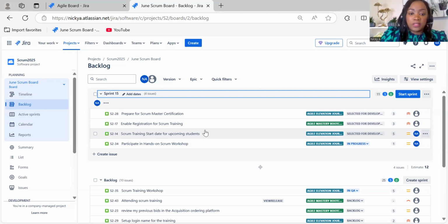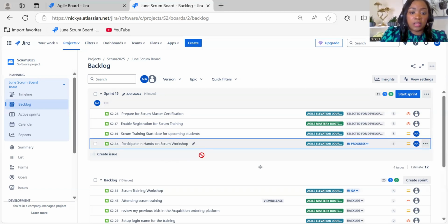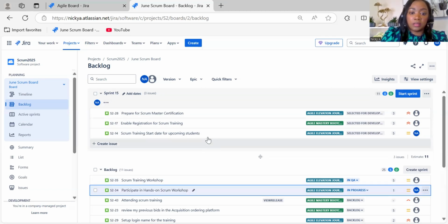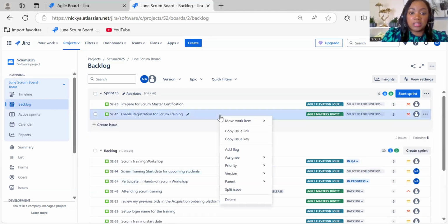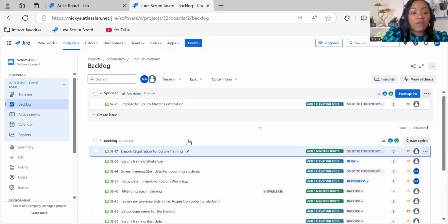So your product owner, for example, can tell you to take out all these stories and put them back in the next sprint, or just put them in the backlog. So we just drag it. You can just drag and drop it into the backlog. Or if you right click on this, it tells you where to move it to. You can put it on the top, it drops it there as well. So right now, we end up at 3 points. Remember, our velocity is only 2 points. So it's showing that this team can only complete 2 story points.